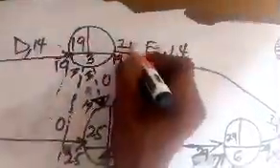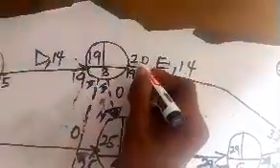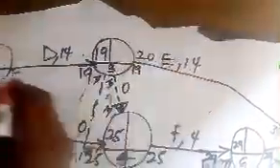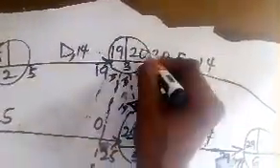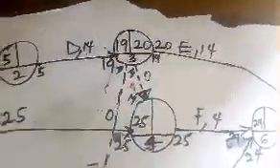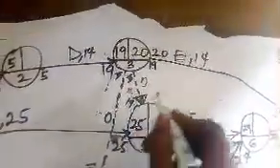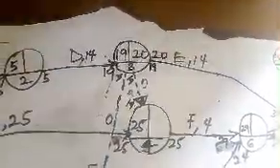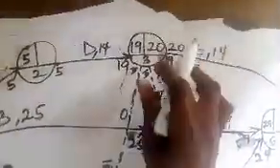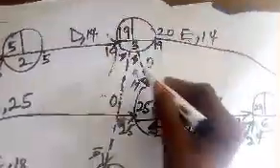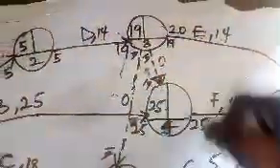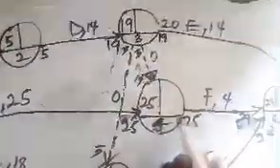34 minus 14, and we have it as my 20. So don't draw your arrow, don't draw your activity. You only have your progression activity to the right hand side, not coming back. So 20 will enter here. When 20 enters here, now what do you think will happen? Is that correct? No, we violated the law that says we need to consider the what? Highest for going. But when we are coming back, we consider the lowest. So 20 will not enter yet because we don't know if the activity coming from this dummy activity when we are coming back will be greater or lesser.